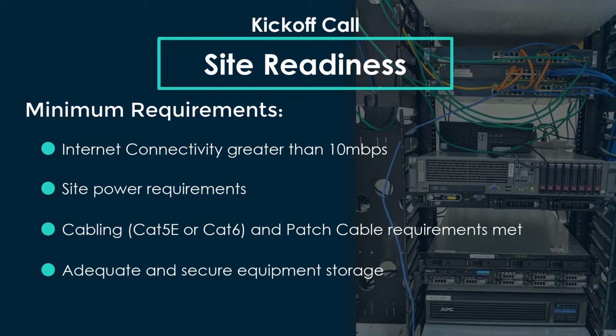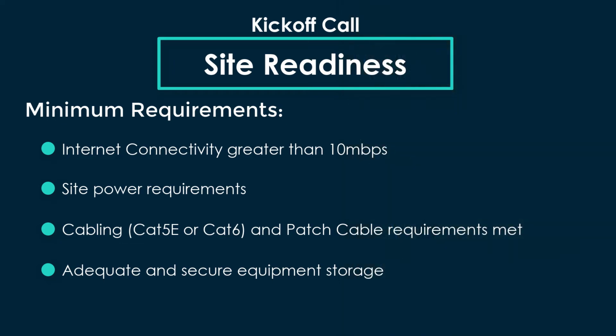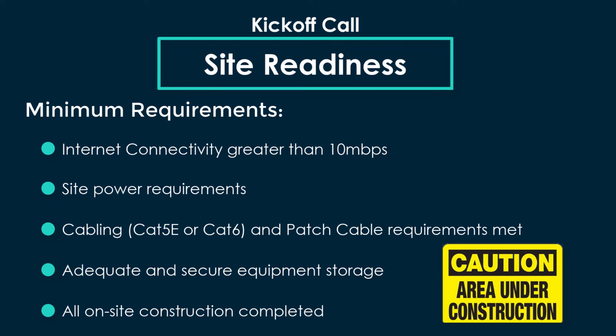If needed, rack mount or wall mount equipment can be ordered with cloud networking equipment for an additional fee. The location of your equipment must be secured from public accessibility. If there's any construction taking place at your install site, we require that it be completed before your install date.